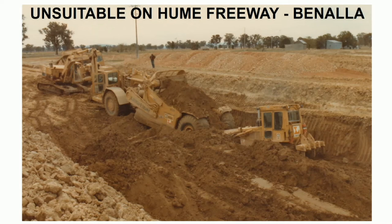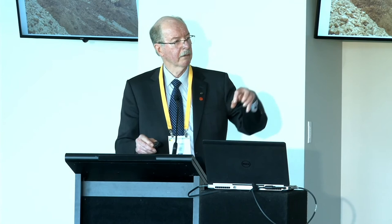For unsuitable conditions, there was a case on the Hume Freeway at Benalla. It was part of the Bicentennial Road scheme, so there was pressure to spend the money quickly, and very small geotechnical investigation was done. They took a post-hole digger and drilled down 750 mm every 400 metres, concluding there was only 250 mm of silt to remove. In the event, we were down three and a half metres digging out unsuitable material — big delay, big claim.